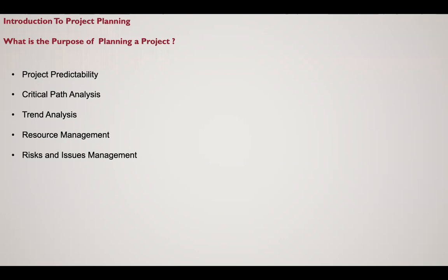Maybe there is what is called LD, liquidated damages, the compensation you pay if you delay the project. And they say, oh, the client said if you delay that project, for every day we'll be paying 13% of the cost price. So we can't afford that. So that planning gives the project predictability. You give them predictability.